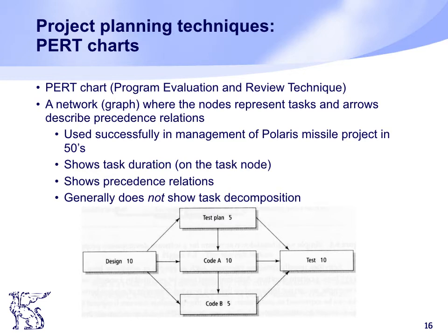It was first developed by the US Navy in the 1950s for a project to develop missiles, which involved an army of contractors. So because of PERT, the project was completed 2 years ahead of schedule. So you can understand how helpful using PERT is. Okay, so now the question is, how does PERT work? It manages probabilities by using many simple statistical methods. PERT breaks down tasks into detailed activities by using the WBS that we have discussed in the previous slide.